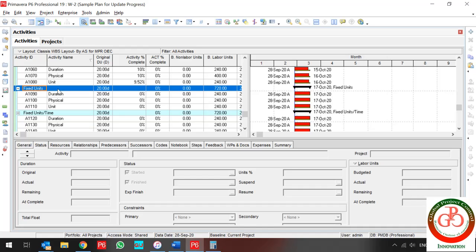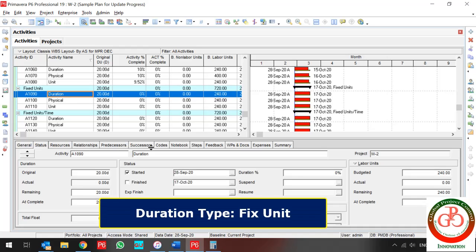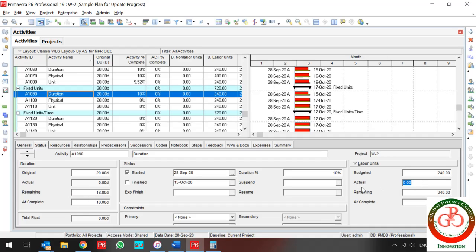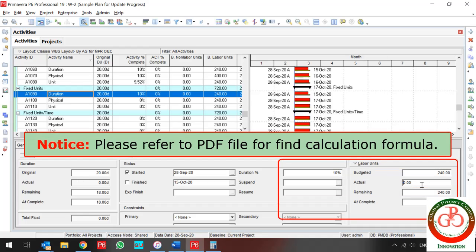Let's talk about Fixed Unit duration type. If your percent complete type is Duration and your duration type is Fixed Unit, and you enter 10% progress, nothing changes for units because this is a fixed unit activity — but my duration does change. So how can I enter my actual manually? If I use the Unit percent complete type for this activity, everything changes automatically.